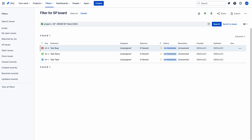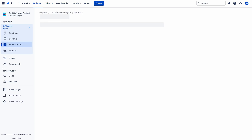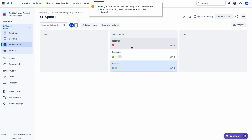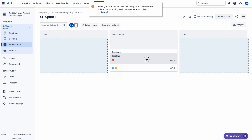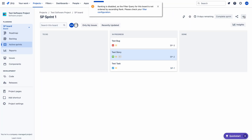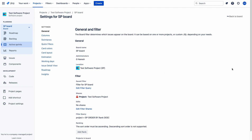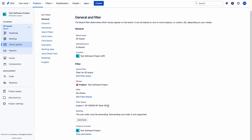So let me go back — I have given the descending order. Let me go back to the board. Now let's see what's happening. Even though the filter query has descending order, we cannot rank the issues in the 'In Progress' column. So what does it mean? 'ORDER BY rank DESC' is also not helpful. You can see the option 'Add Rank' under Ranking, and there is information: the sort order must be ascending. Descending order is not supported.